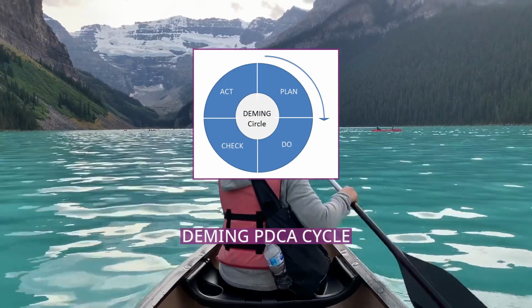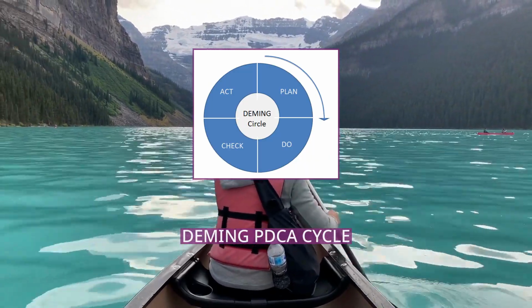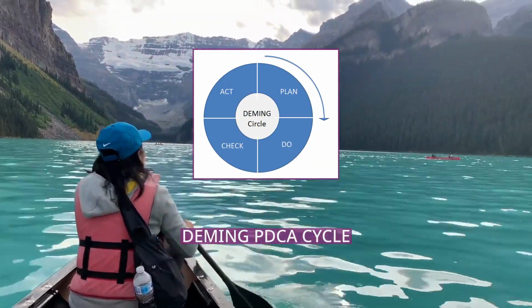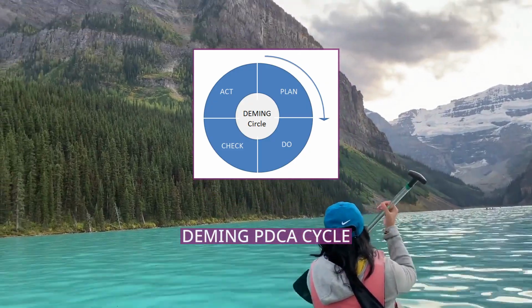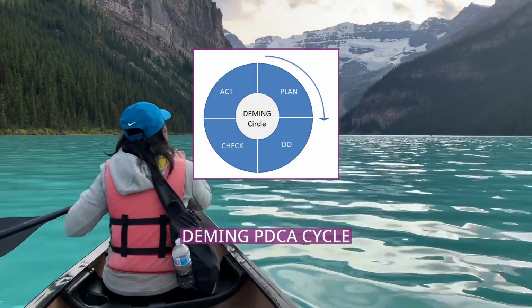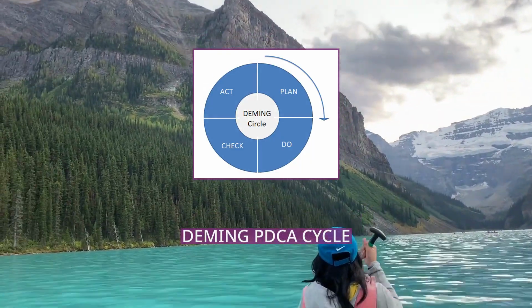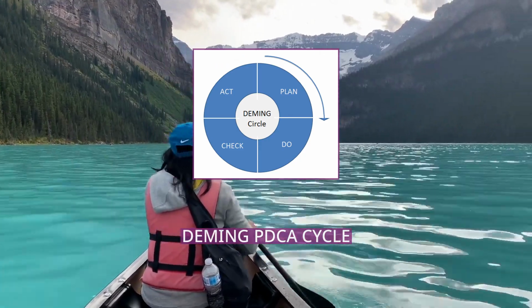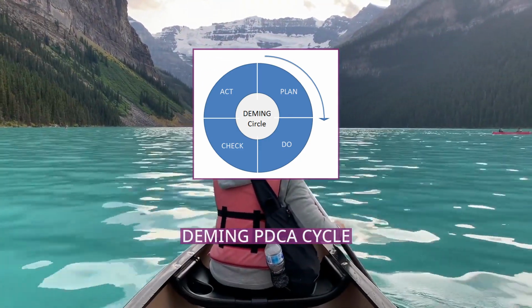A functional design is by nature influenced by the technology platform chosen for implementation, and some basic design decisions will need to be revisited when early assumptions prove later to be wrong or costly to implement. This became the forerunner of the rapid application development method, which caused these 2 phases to become cyclical and work in tandem. SDM4 only partially solved the problem of meeting customer requirements. Modern software development methods go several steps further by insisting, for example, on incremental deliveries, or that the customer appoint key users of the delivered system to play a role in the project from start to finish.